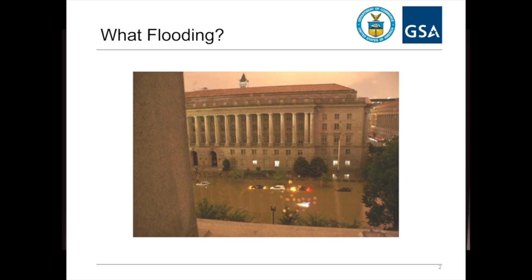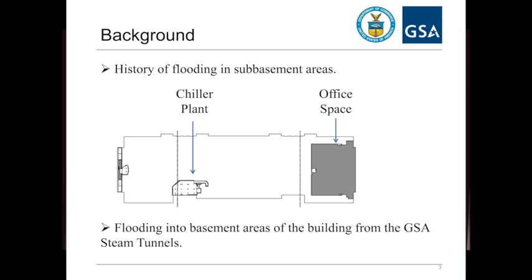The design went from 2004 to 2007. The reports from the 2006 flood came out about the same time the design was finished, so there wasn't actually a chance to integrate the final findings from the reports, but lessons learned spontaneously from the event were able to get one major change integrated into the design that we'll get to in just a second.